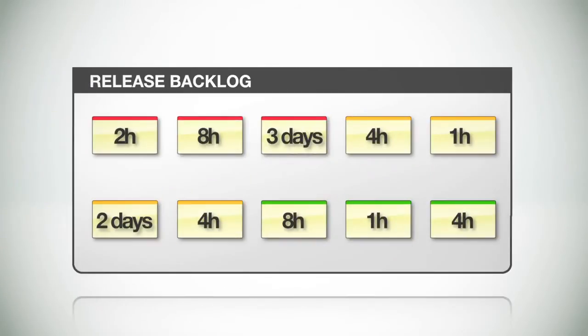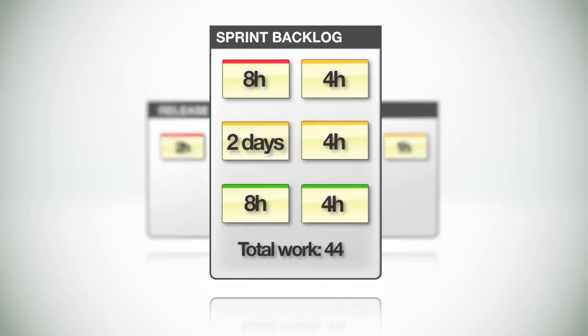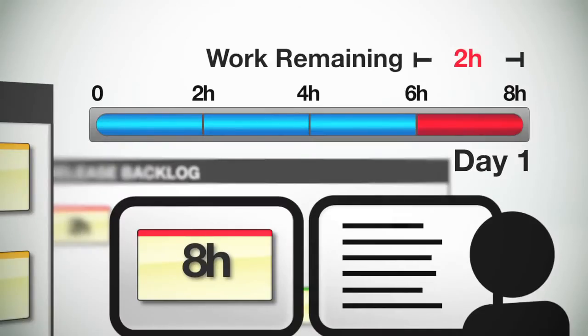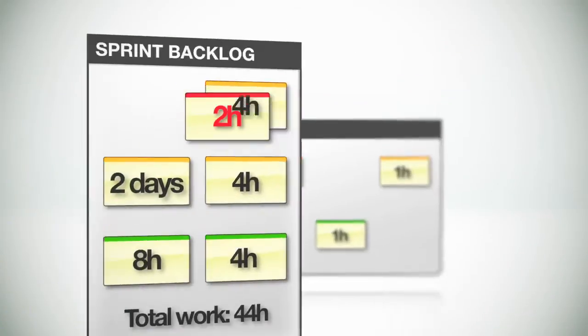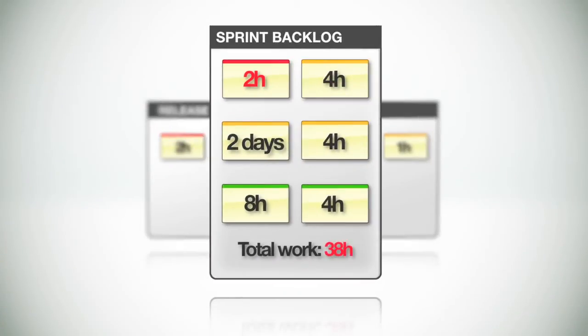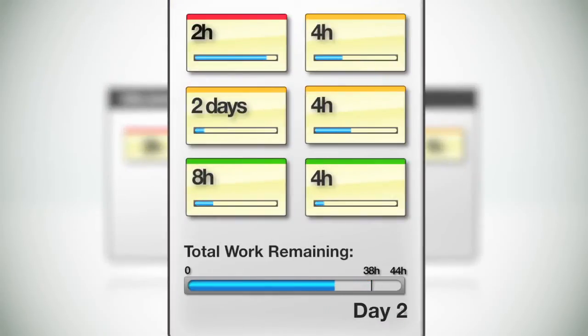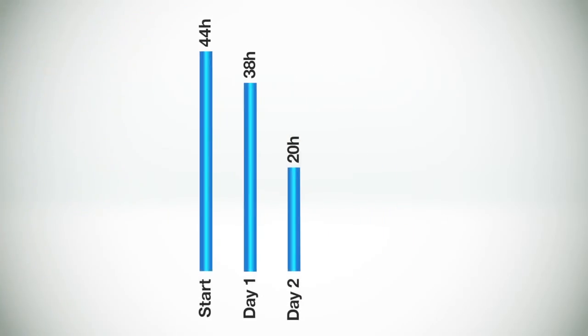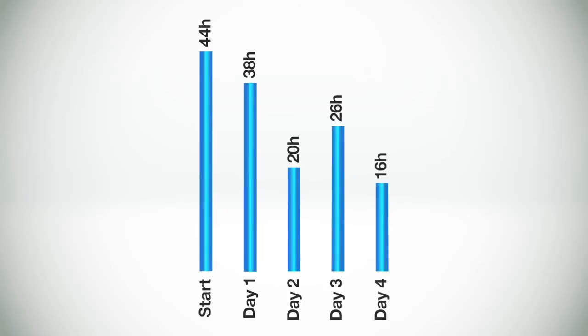As you recall, part of the release planning process was to create an estimate for each user story in the release backlog. The collection of these estimates for a given sprint represents the total amount of work that must be done to complete that sprint. As each team member goes through and makes progress on one or more of the user stories, they simply update the amount of time remaining for each of their own items. So the total amount of time remaining on the group of user stories that make up a sprint changes on a day-by-day basis, hopefully going downward until it hits 0 when the sprint is complete. The burn down chart aggregates the remaining work data and shows it visually. It's brilliant because it communicates a massive amount of information in just a few seconds.